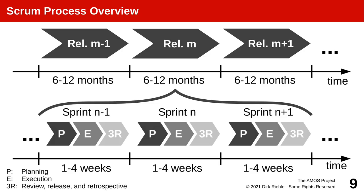The Scrum 2020 Guide talks about sprints — short time boxes or iterations in which you perform a full cycle of planning what you do, executing what you planned, and reviewing and assessing quality to make a release decision, finishing with a short retrospective. The key of agile methods is that sprint lengths are short: one week as in the AMOS project, two weeks more likely in industry, up to four weeks but not longer.